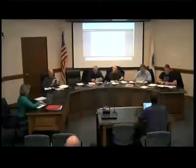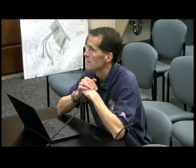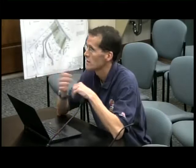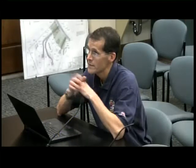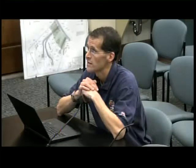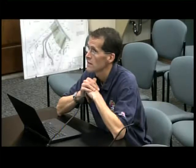Yeah, what's the length of the boardwalk that you're proposing? We are proposing approximately 100 feet, and that's just based on all the low areas that we've seen. Again, we'll know best once we get in there, and you can see in the picture in Exhibit C, currently up on the screen, that we're proposing the use of our pan method. Instead of actually digging, we use these galvanized steel pans. That's a boardwalk that we put in last year, and possibly the year before at Harold Parker. So really easy to install and really minimal impact to the wetland in doing so. Okay.